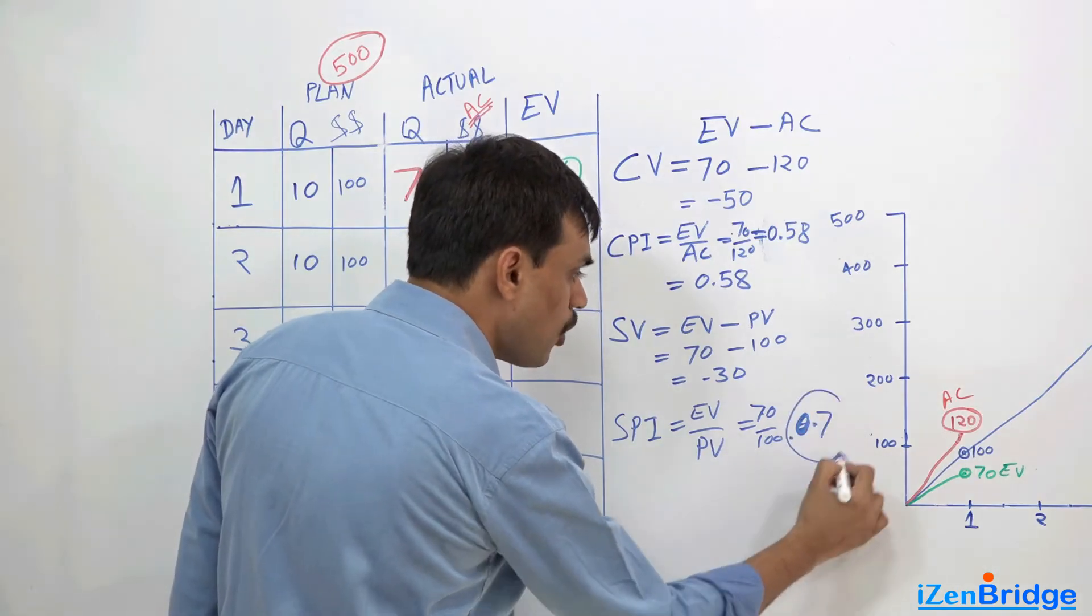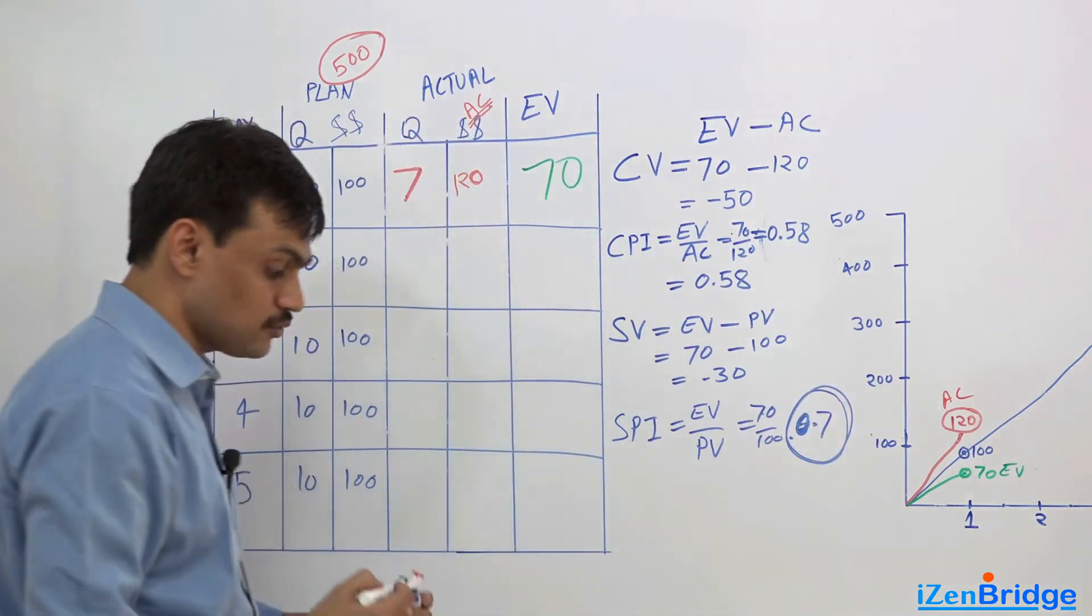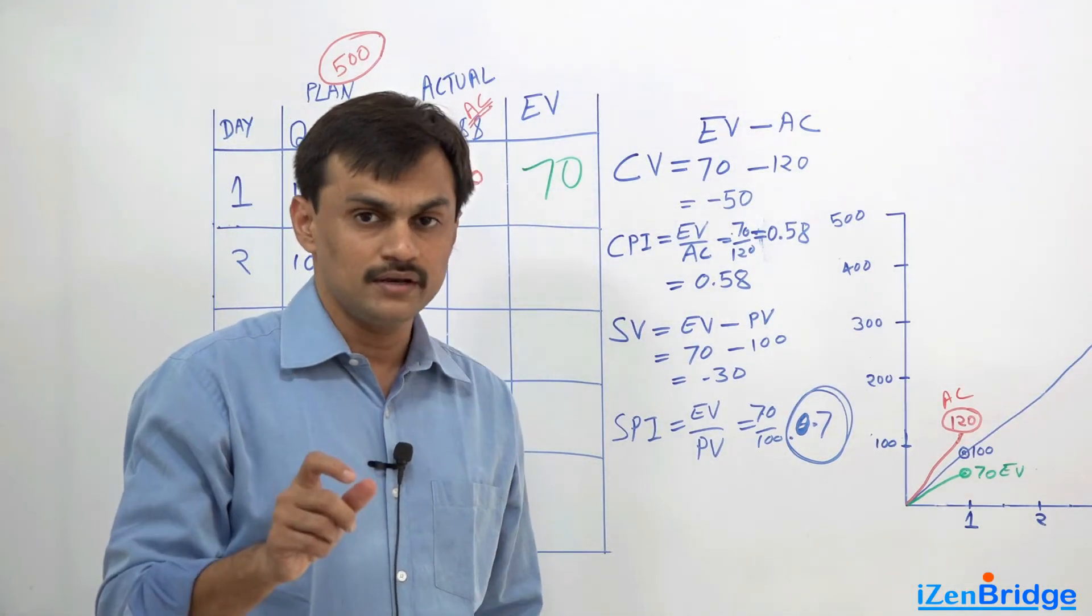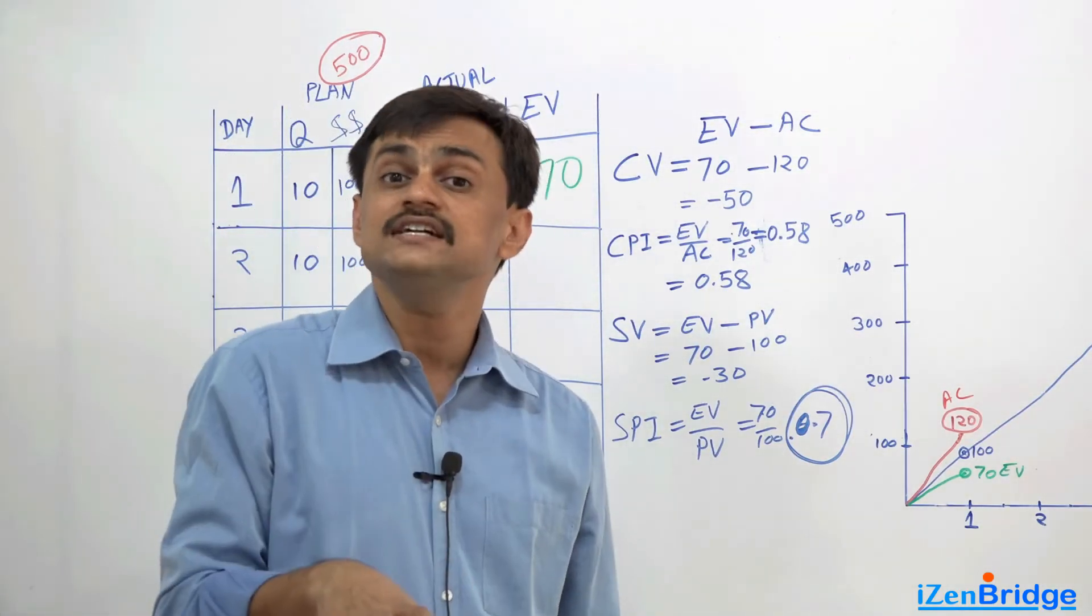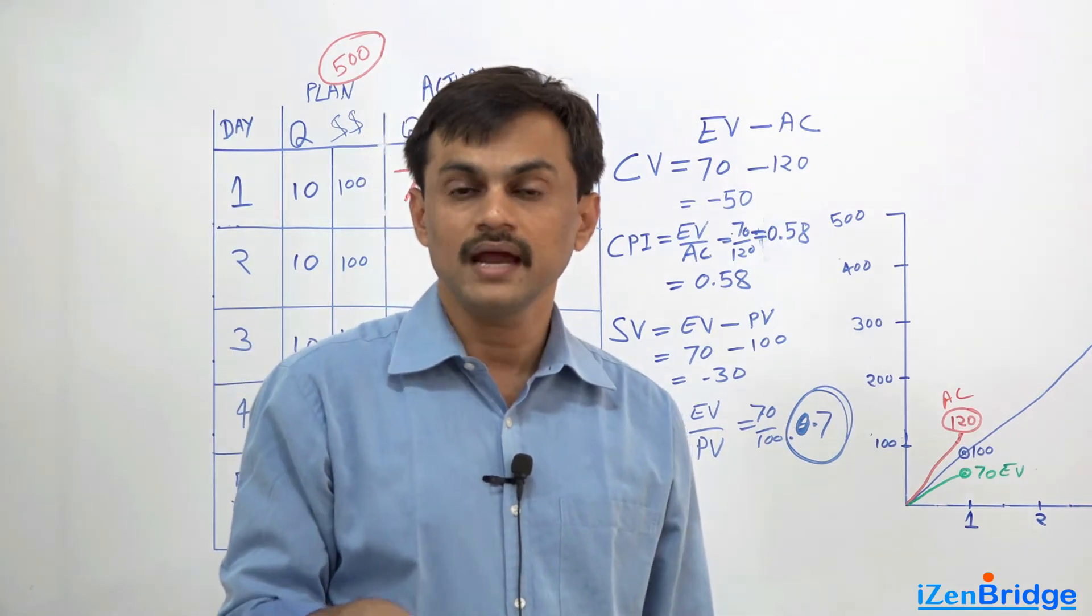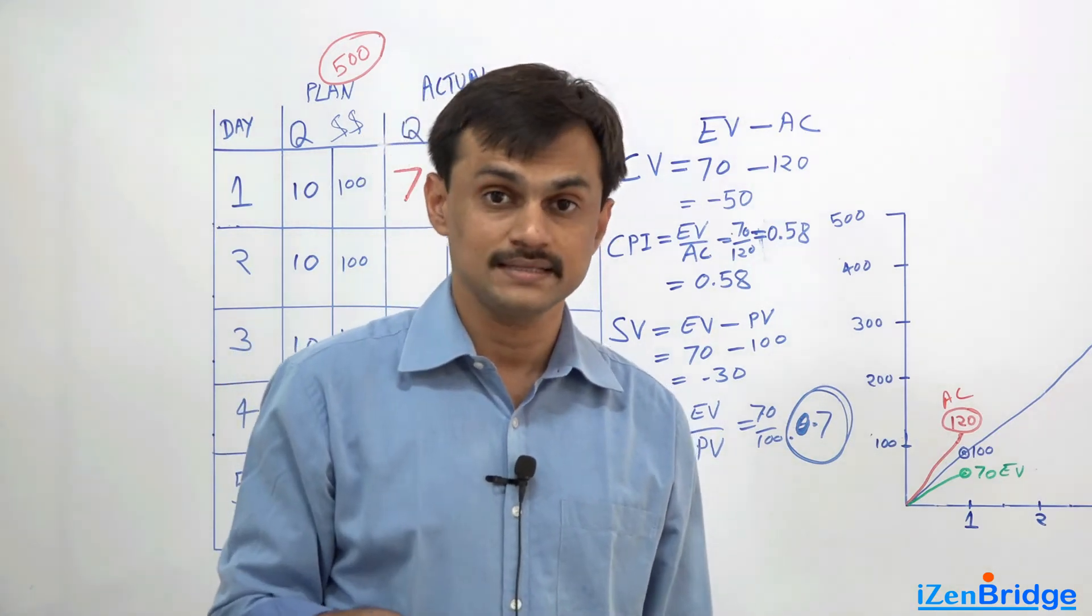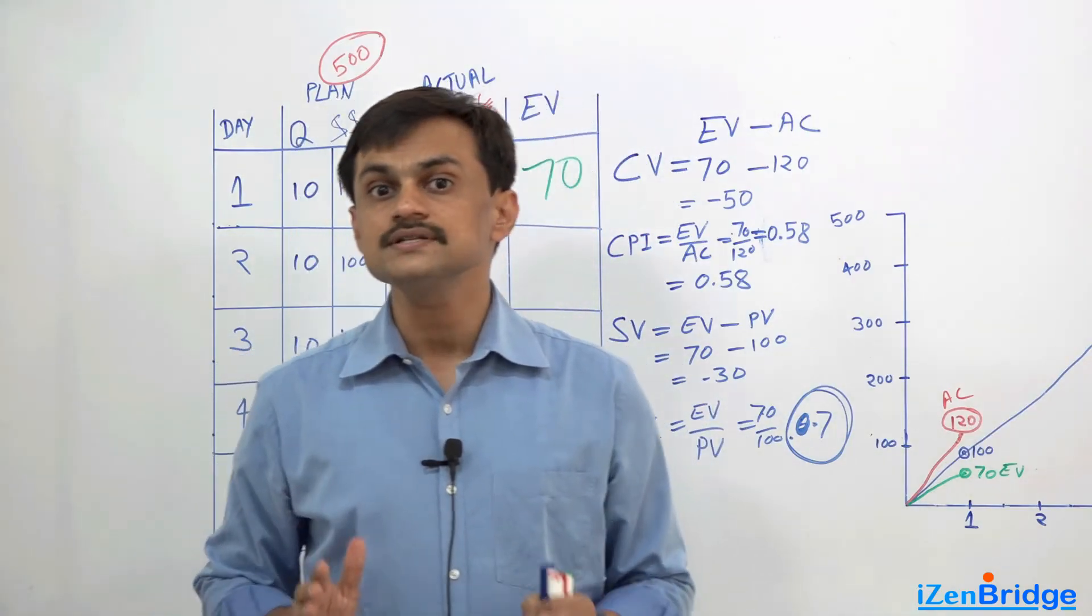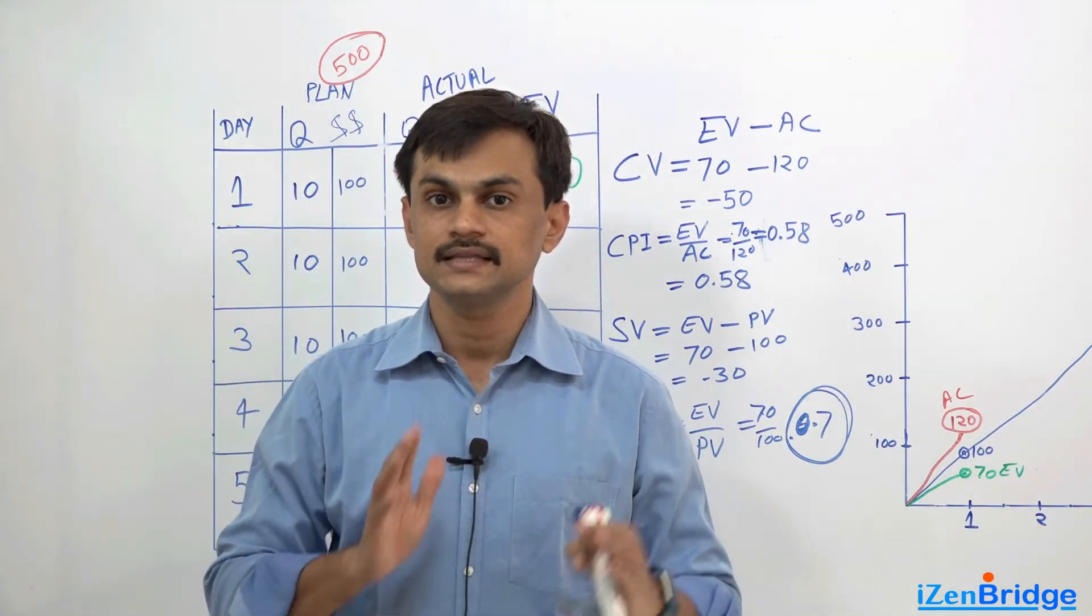So it is like how much percentage we have completed work against the plan. So 0.7 shows that we have completed 70 percent of the planned work, and that is what the schedule performance index tells. It primarily tells at this point in time how much percentage we have completed the planned work.